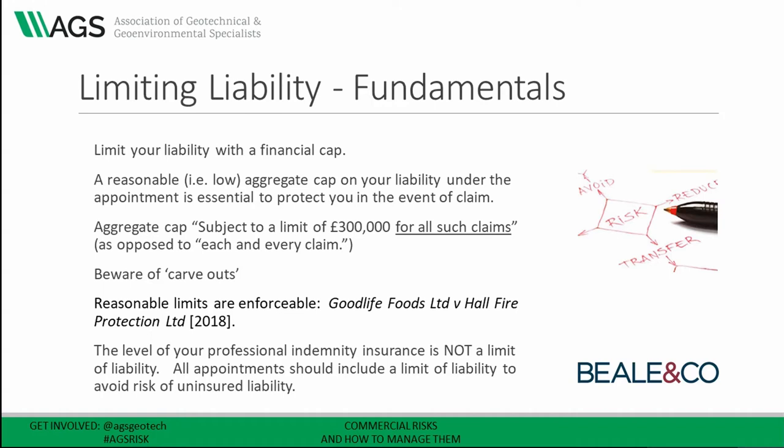First and foremost, limit your liability with a financial cap. A reasonable aggregate cap on your liability under the appointment is essential to protect you in the event of a claim. An aggregate cap means, for example, subject to a limit of £300,000 for all such claims, as opposed to each and every claim — this prevents your client from making multiple claims of £300,000. Also watch out for carve-outs for certain types of loss or scenarios, which are exceptions to the caps on liability that might be given away in other clauses.